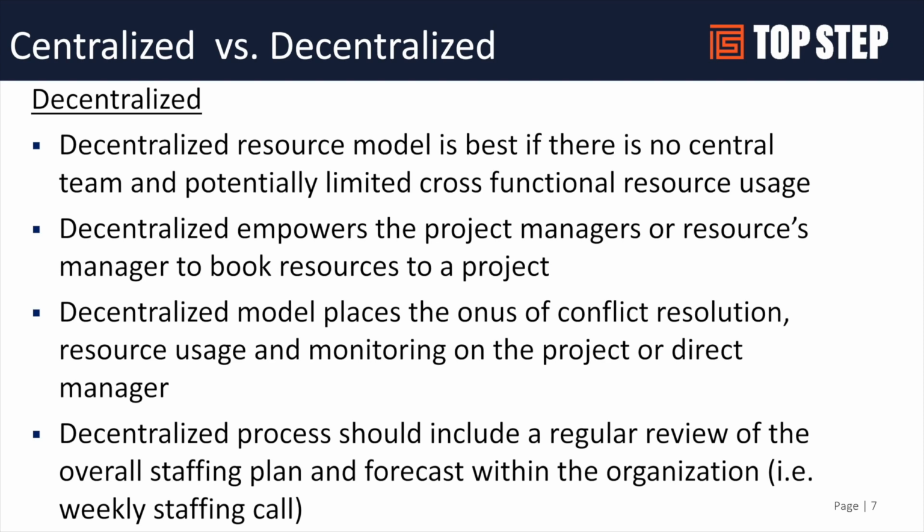It has the potential to create a lot of conflict where multiple project managers are trying to use the same resources. So there does need to be some sort of a weekly conflict approach to removing the conflicts and making sure that each project manager gets what they need. And usually the managers are working to make sure their folks are not being double booked.